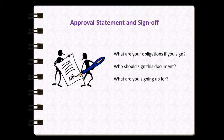But you need more within this section. You need a clear statement as to what it is they are agreeing to when they sign the charter. So include two parts: obviously a signature block where the stakeholders can sign, but also include a statement of some kind as to what they are agreeing to when they sign their names.